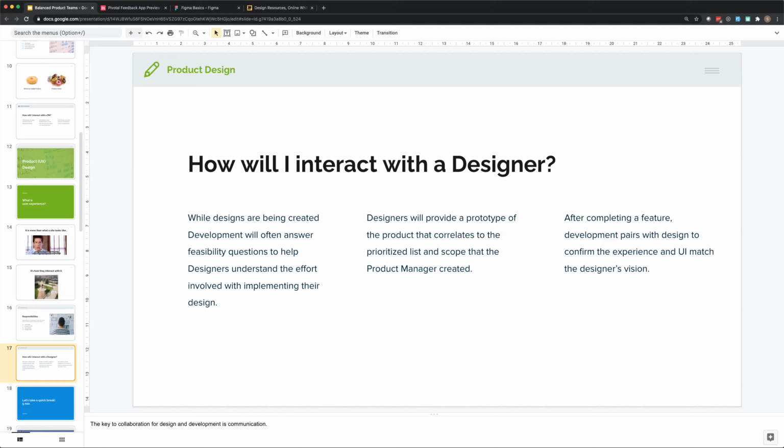So we just sit side by side and look at what you've made and make sure that it matches what the design was intended to be. I like to have an 80% level of expectation. If we can get it to 80% there, that's usually good enough to get the story accepted, and be flexible on it. Obviously it isn't going to be pixel perfect every single time. And most designers are that way,